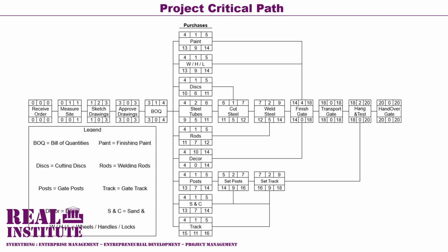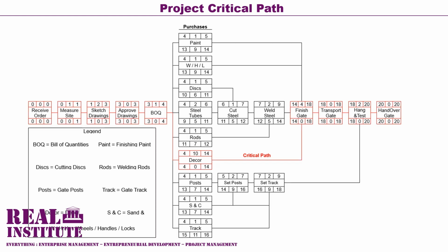However, the project activities with zero float are the critical project activities. They cannot afford to be delayed or started late by any time, even by 1 day, without causing the entire project to be delayed or becoming late in completion. Project activities with zero float are on the project critical path, and they are the critical project activities.